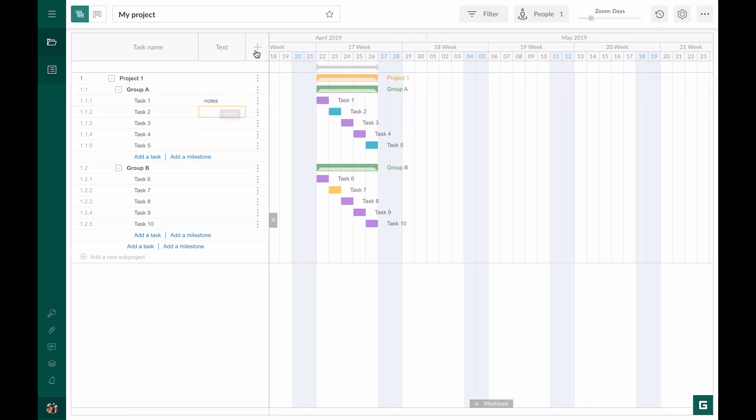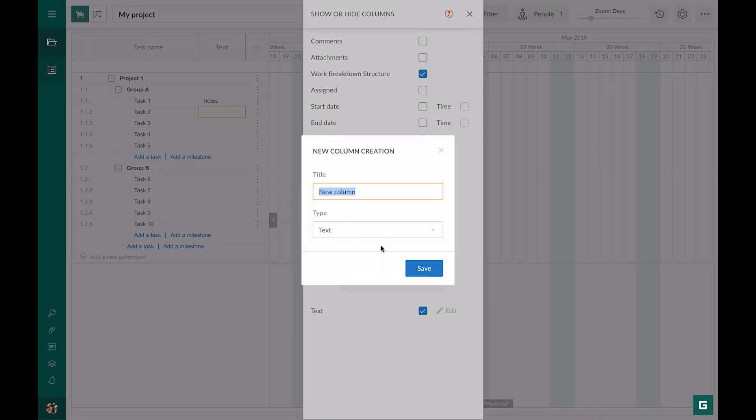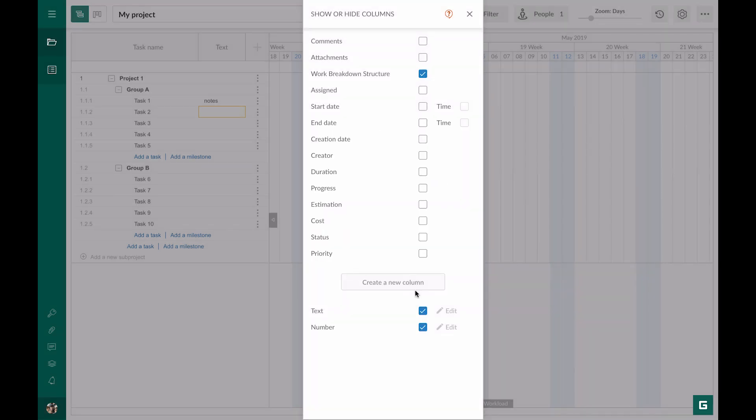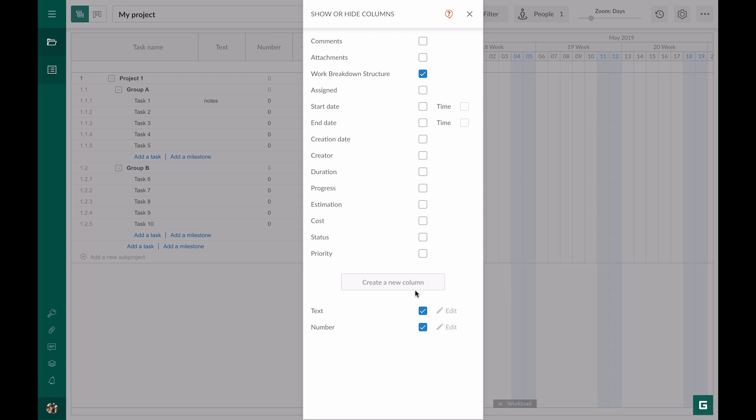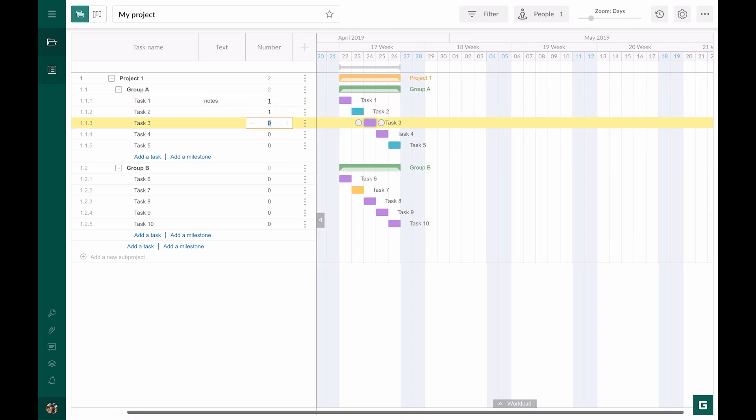The next column is number. You can see that it has one additional field, aggregation. By default, sum is set. Let's save and figure out how it works. I enter numbers. They are summed up in a parent task and likewise for the whole project.